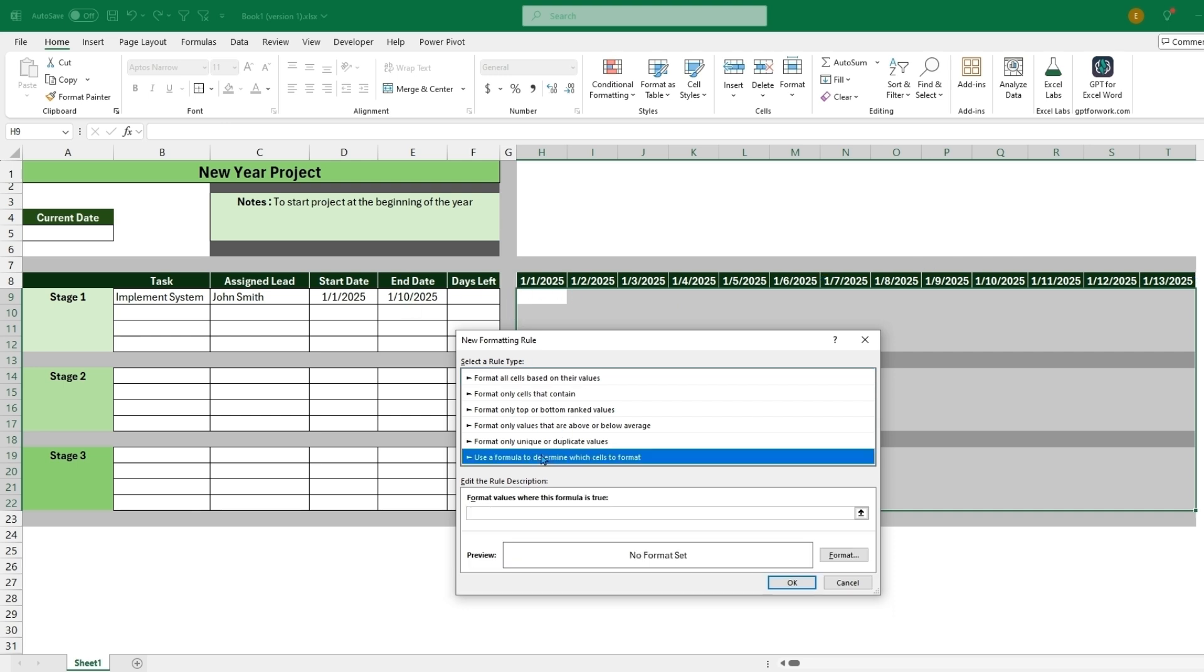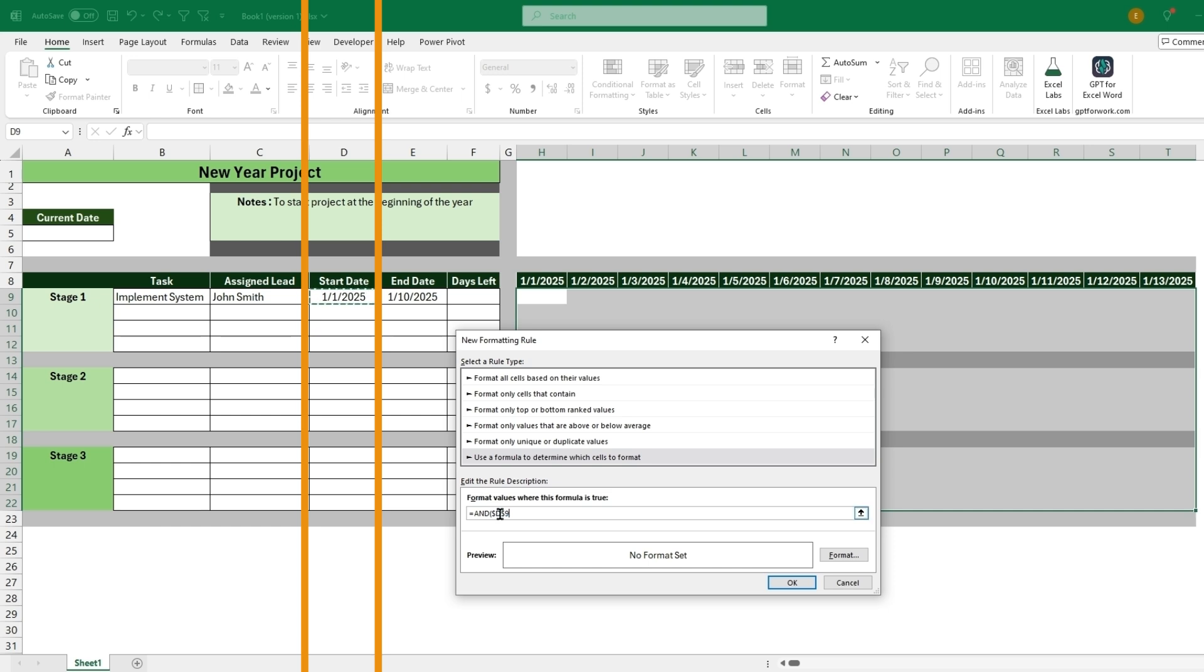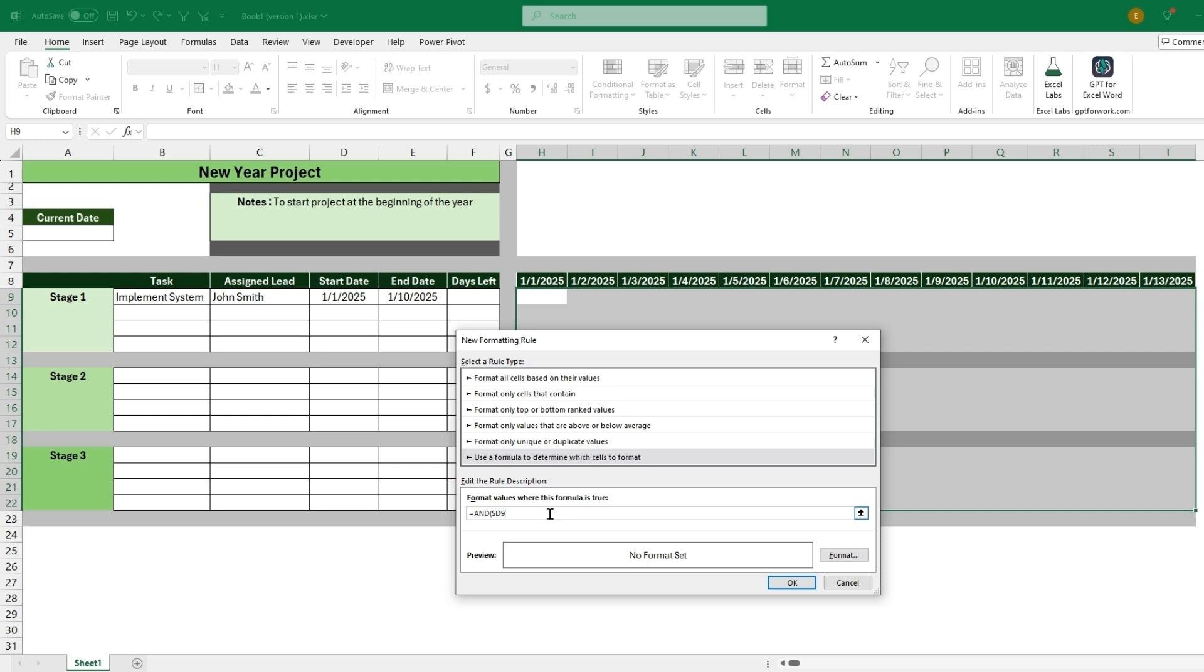So we will use a formula to determine the format, and this formula, being if it's true, we will create a different format for the cells. It will be equals AND. So AND we'll be checking multiple conditions. The first condition we want to check is if the start date, but we want to keep it in column D since that will be where our start dates are. So we can keep that dollar sign, meaning it's fixed in column D and fixed in cell nine or row nine. We can get rid of that dollar sign, and then this will be is less than or equal to H8.